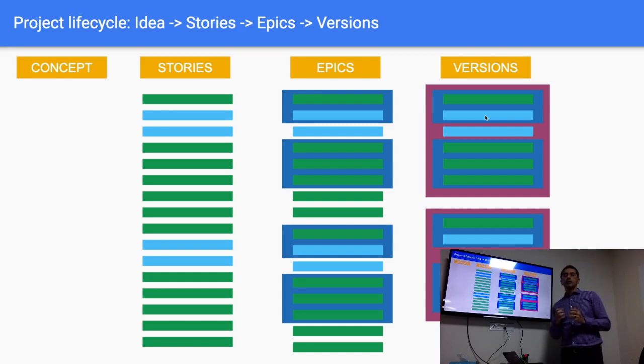So when you create a story, you say, for example, that as a person new to this platform, I should be able to get to know more about the platform by landing on the site or landing on the platform. Now that's basically a story which tells you to create a home page, which gives you more information. A non-functional requirement is something like the page load speed should be less than 2 seconds. Okay, that's non-functional. It's not something which you can see in the UI, but it's a non-functional requirement that you have to adhere to. It's a system requirement, so that's not a task, but it's a non-functional requirement of a story.